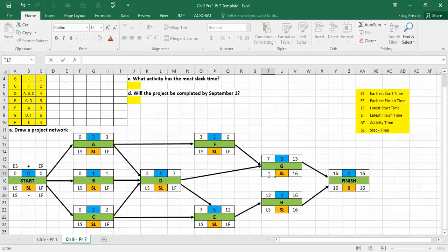I started, I'm going to finish. And then right here, 16 minus 4. Wait, got to put an equal sign. Okay. Excuse me. Now for E, the only predecessor for H is E, therefore the latest start, latest finish is going to be the same right here. Okay, now for G, you have D and F as predecessors, correct? But let's go ahead and finish this one since we have a value. 12 minus 5 is 7.